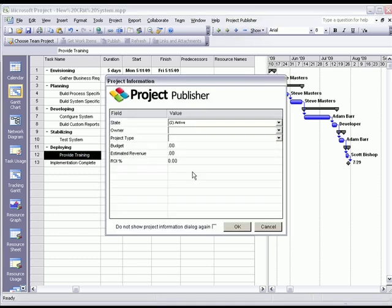So the first step in publishing a project plan is selecting the appropriate project attributes. These attributes become important when it comes to portfolio reporting. This will allow executives to group projects for reporting in different ways. Let's go ahead and fill out a couple of these attributes.